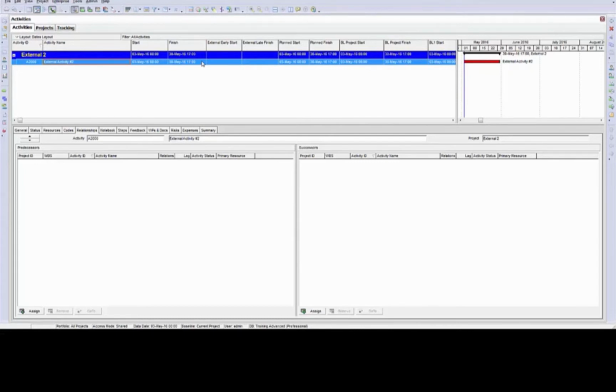I've run into this numerous times where I would have my Gantt chart showing a path of activities or a sequence of activities where the first 20 activities in the path were positive float and they were green on the Gantt chart, but all of a sudden we get down to activity 21 and the path turns red for no reason. What was discovered is that the remainder of that work was imported from a contractor or from an external source, and it had an external link on it in the previous system, but we didn't have that external link in our system.